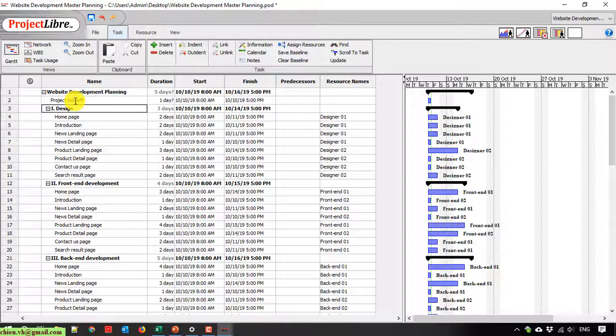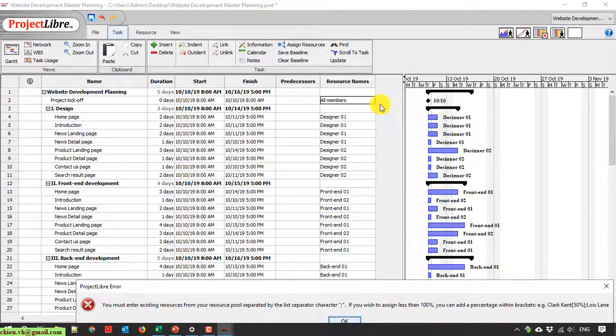So now here I will add a new task in project kickoff. On below task will be starting after the project is kickoff. Okay. 0 day. This is a milestone of the project, so it should be duration is 0. On team member. Yeah.